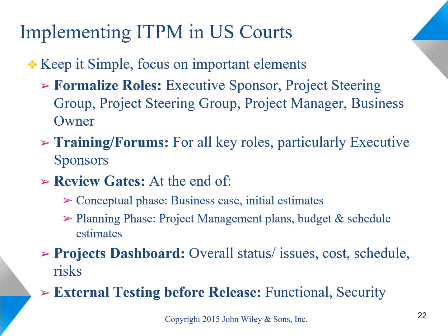We also established a simple system for projects to report their status. Any issues they were dealing with, as well as their costs, schedule, and risks, were reported on a monthly basis. The system provided transparency to all projects because all the executives in the organization had access to this project dashboard. Furthermore, as issues were identified, various organizations could see if they were impacting a project and could address those issues.